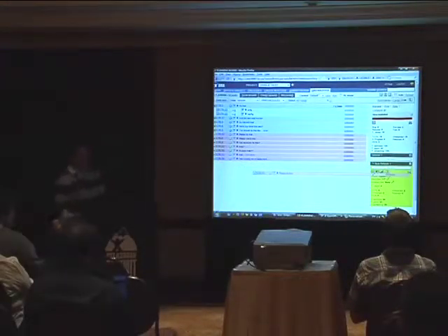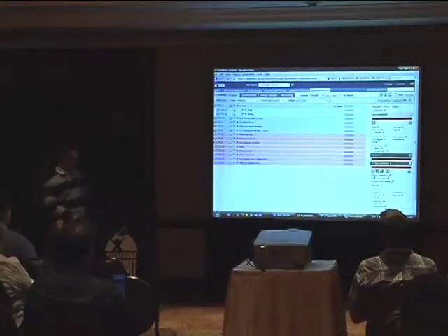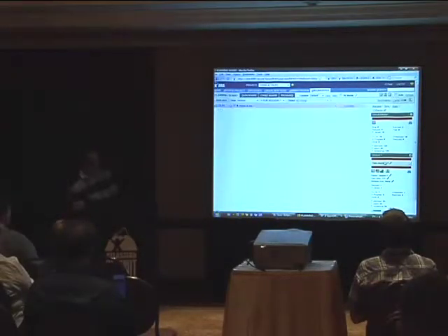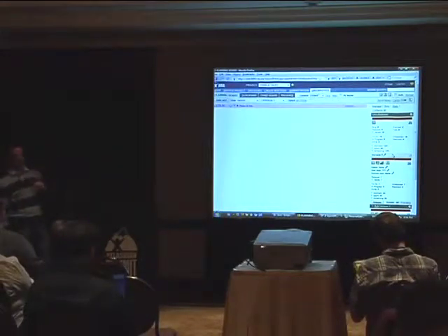As soon as you drag and drop an issue and associate it to subversion 1, it will be automatically linked to your version 1 also. So in my version 1, I will see the new issue and my subversion. In the parent folder, you will see all the issues that are in the folder and the subfolders. And in subfolders, you only see the issues in the subfolders.